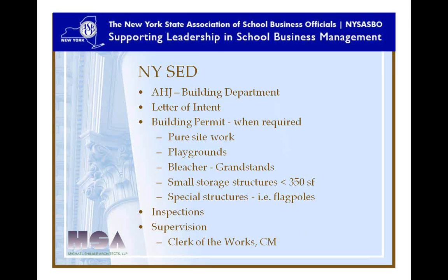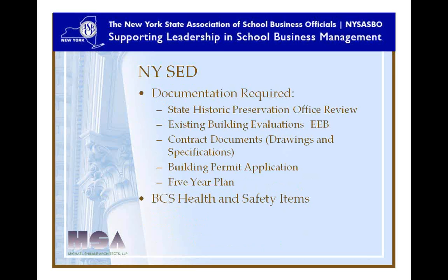They want to see comprehensive documentation. Here's a listing of some of the things that they will require. SED asks that you go to SHPO, the State Historic Preservation Office, every time you do a project. Make sure your buildings are not historically significant. For most projects, it's really just a ministerial event.